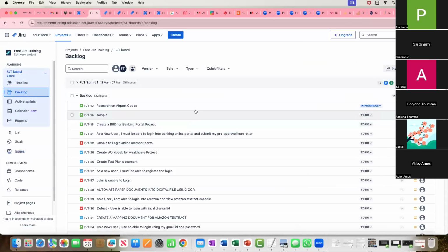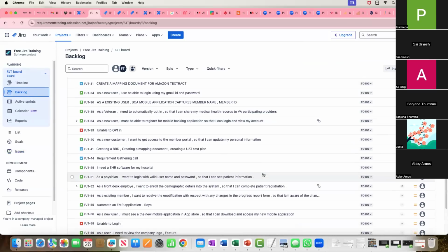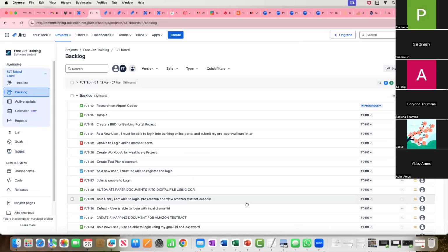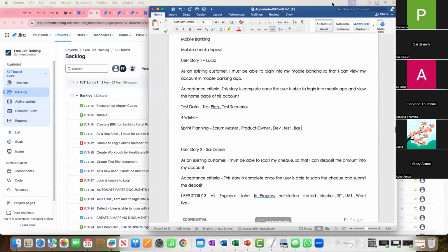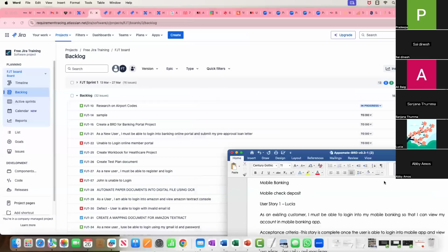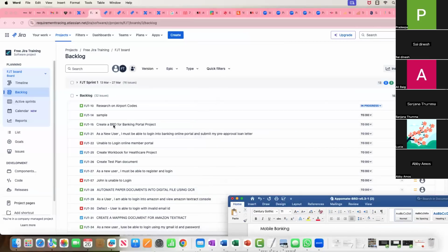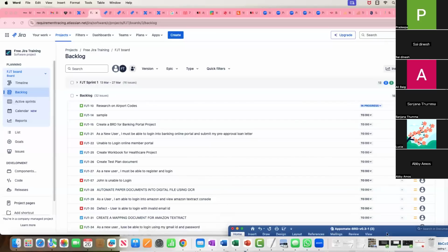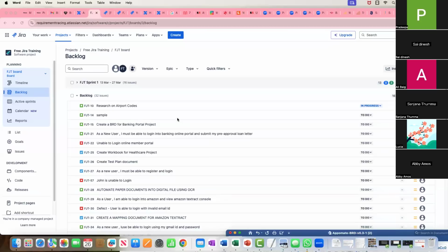Okay. So for the story level, let me go to this backlog. You have maybe 100 to 200 user stories and you have given your points. So tomorrow, let's say from Monday, you have a sprint plan. I mean, Monday is your new sprint start date. Tomorrow will be your sprint planning call. Your product owner will do this WSJF calculation, and then they will come up with a list of user stories, and they will rank the user stories based upon the WSJF score. So it's very critical.